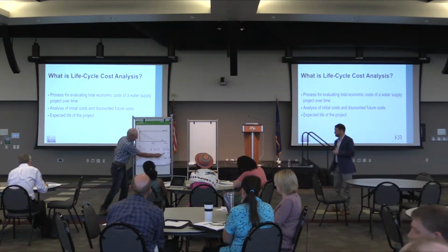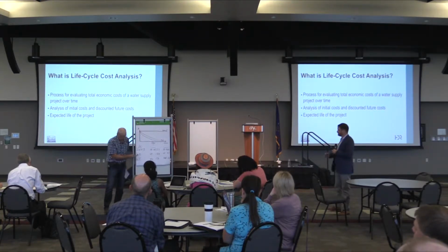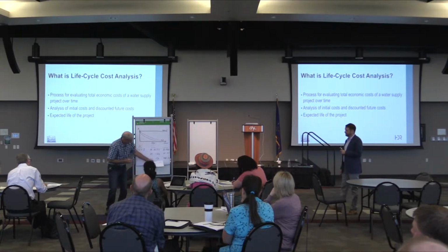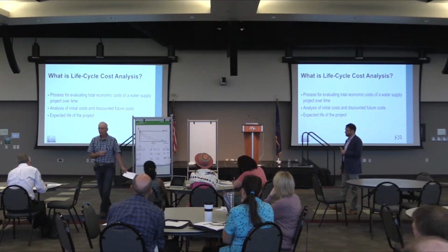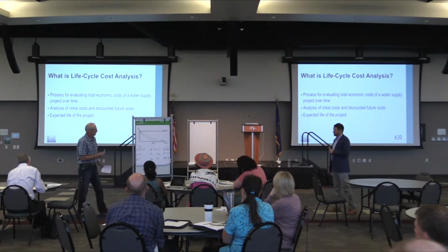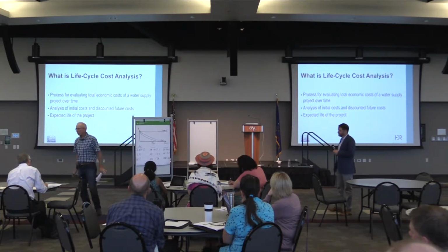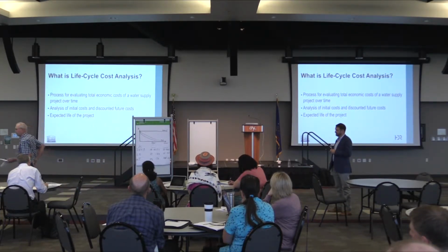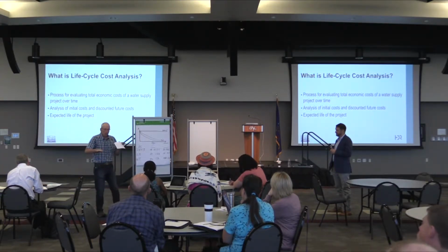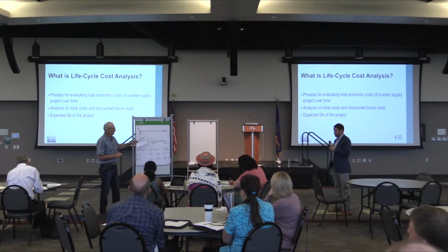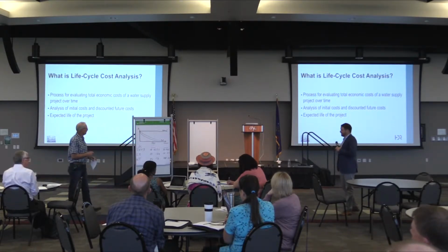Or if you took 5 cents today and put it in the bank, at 6%, you'd have a dollar in 50 years. At 10%, a dollar in 25 years is only worth 9 cents, and in 50 years, only worth less than a penny. That's why we discount things from nominal to real dollars. We ignore inflation. Don't anybody ask, what about inflation? We ignore inflation. Inflation is not a factor in what we're doing, unless you think something is going to inflate in cost more than something else. But we just ignore inflation. We've simplified that for now. Yes, we've assumed it away.